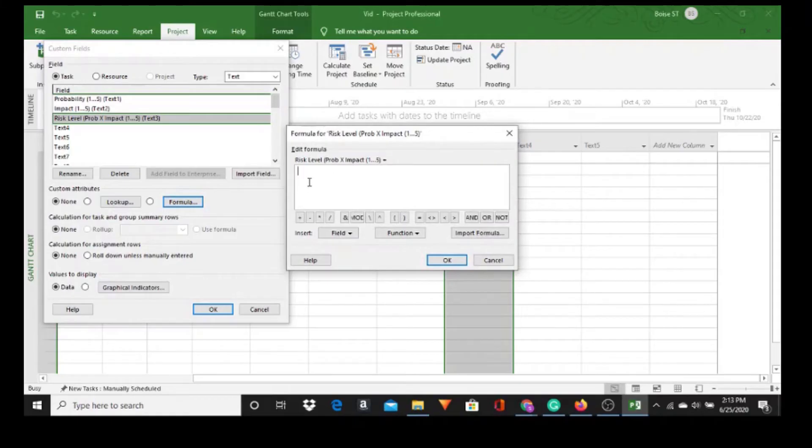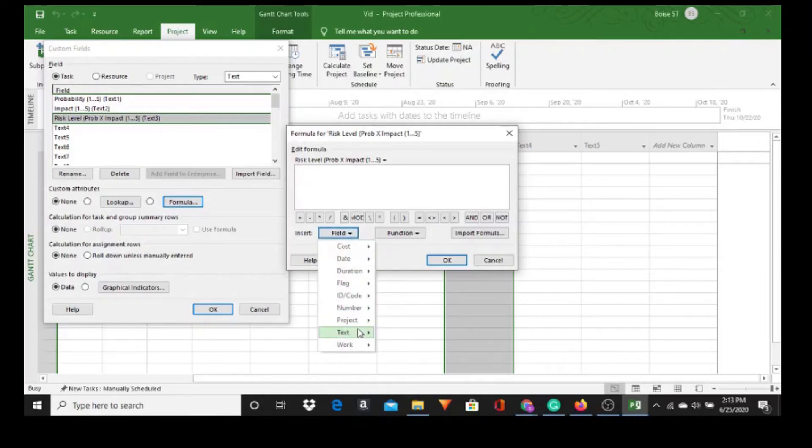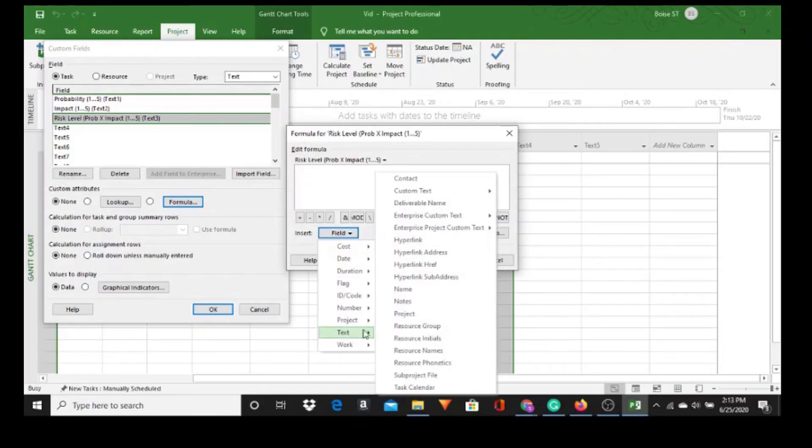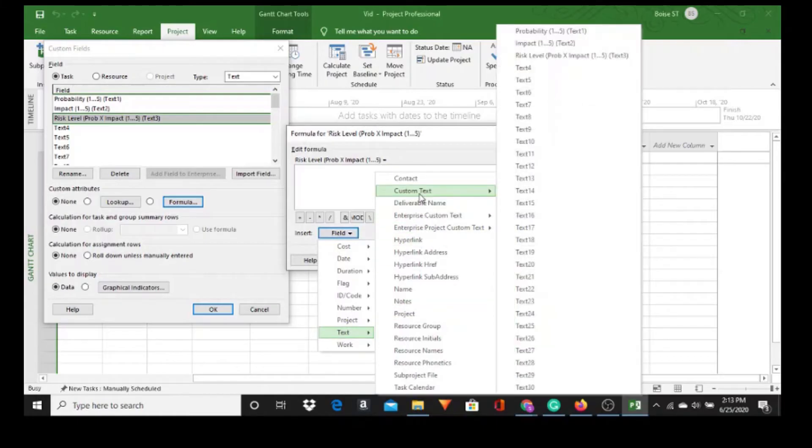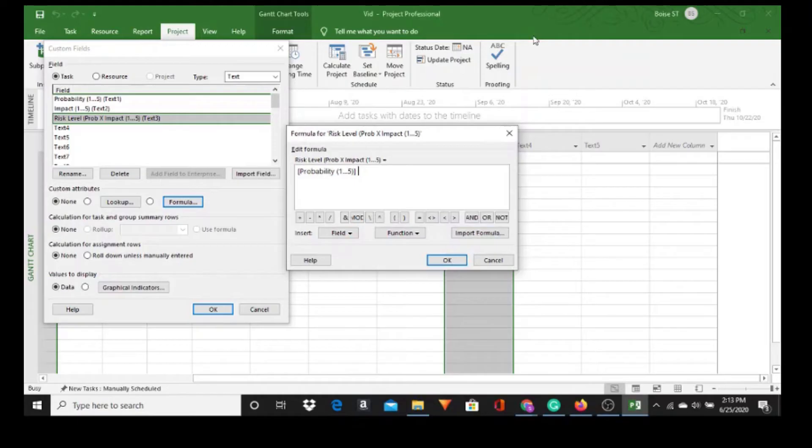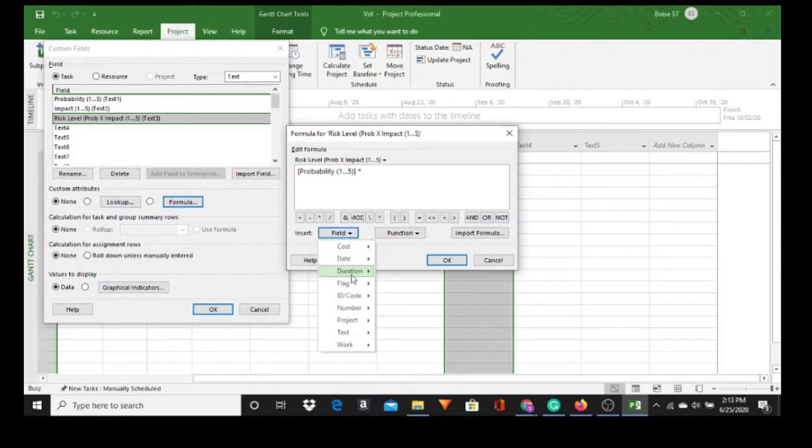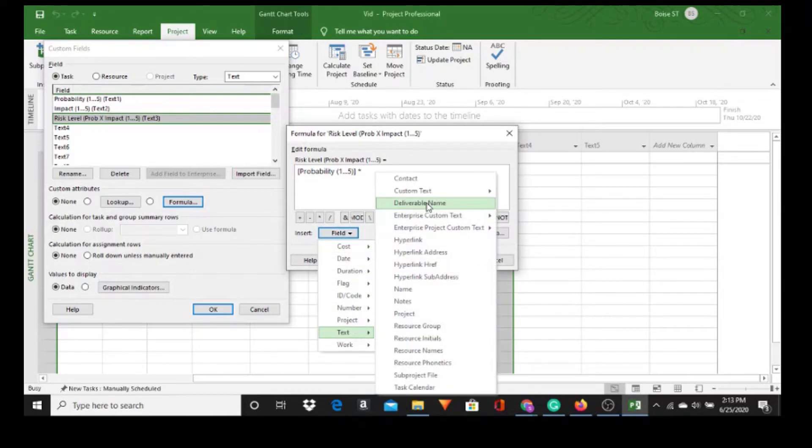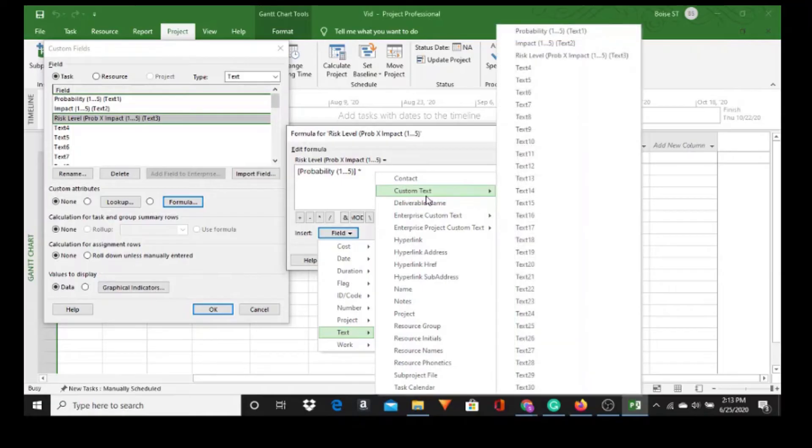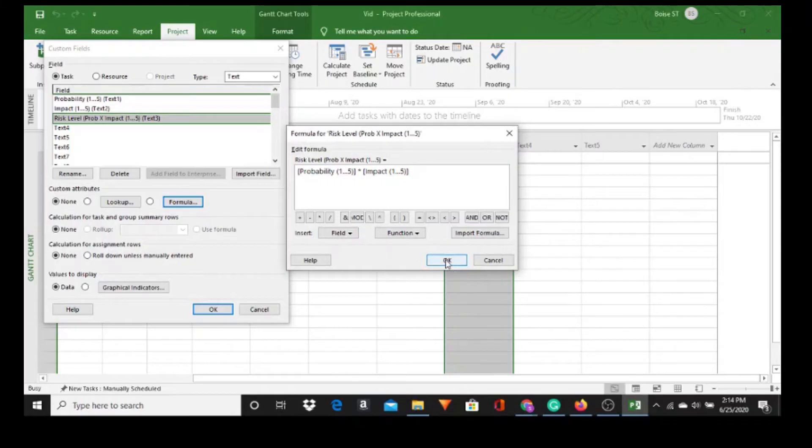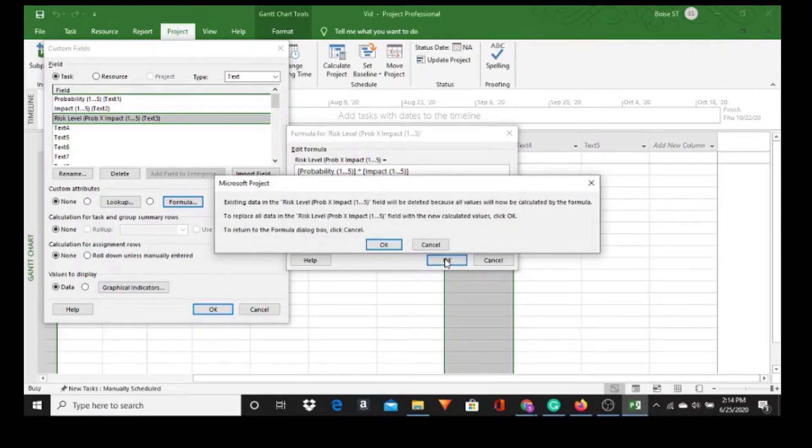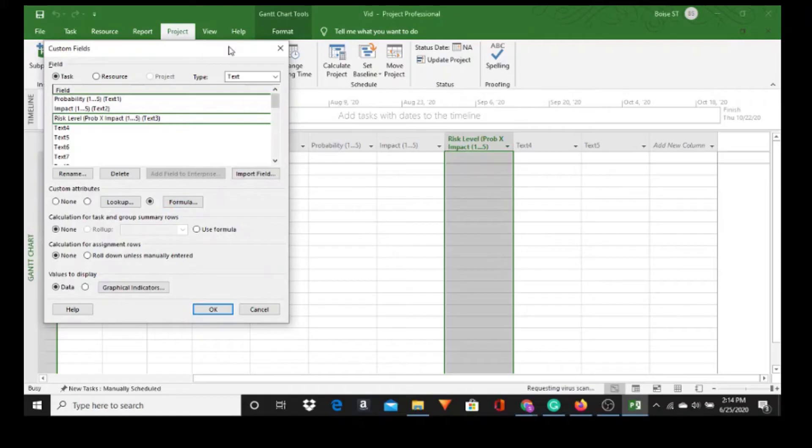Now you can type it out but what I prefer to do - because if you do it this way you're not going to make as many mistakes - we'll go down to Field, Text, Custom Text, and we want Probability, the one we just created, times. You can do the asterisk on your keyboard or you can do it right here. Field again, Text, Custom Text, and times Impact. Okay, it says that the data in the existing field will be deleted. And if the formula takes, we'll go straight. Okay, it did take. We went straight back to there. So okay.